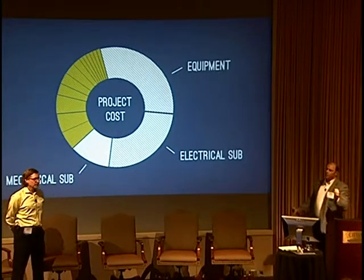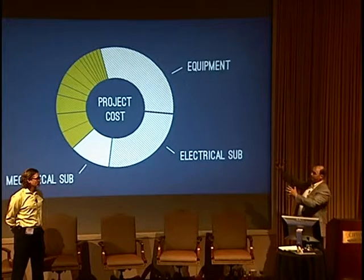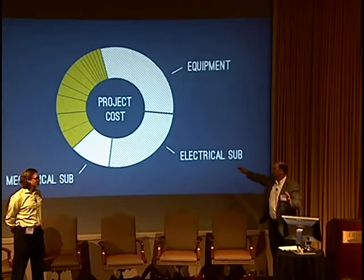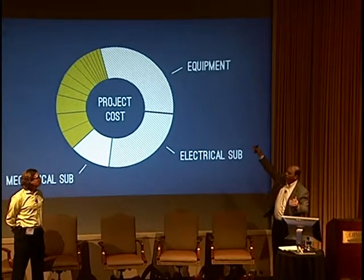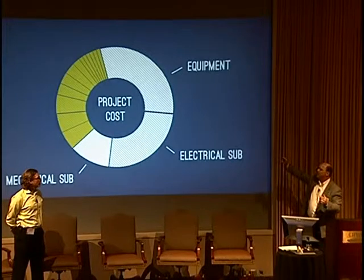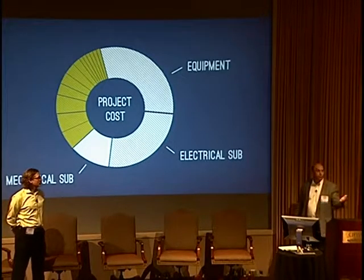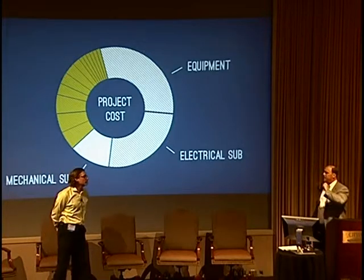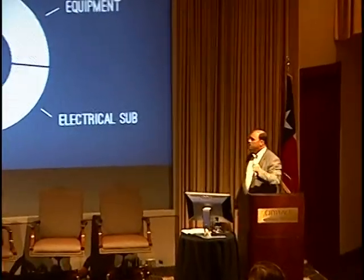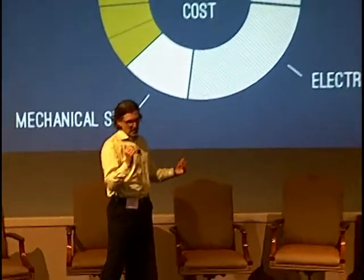So the opportunities to really save with modular are in some of the electrical labor, mechanical labor, but still the electrical subcontractors have a lot of commodities to buy. Just as you would on a module, you'd still be buying copper, right? So there's labor in here that we can get more efficient with by working in a factory environment. But it's not going to necessarily lop a third of your cost off your job just because you've decided to go modular. Yeah, and in a bit we'll show a schedule slide and tie these two things together. It really has a lot to do with how soon you can complete design, pick up the pencil, and pre-order things too, and then you can realize even more savings.